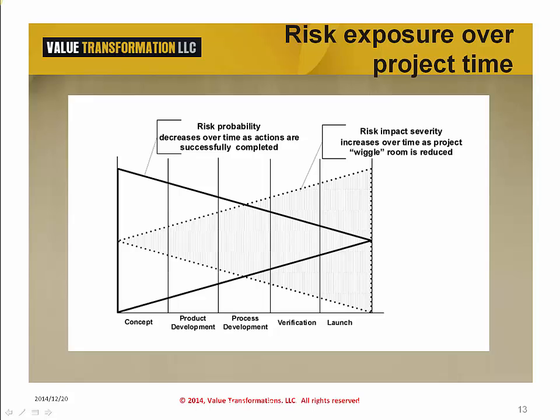For example, if I select a particular concept and have already paid for tooling, then I discover there's some physical aspect that needs to be changed, then I must consider what this means for the tooling of the product. These previous decisions reduce the range and types of actions we can take to mitigate or eliminate the risks.